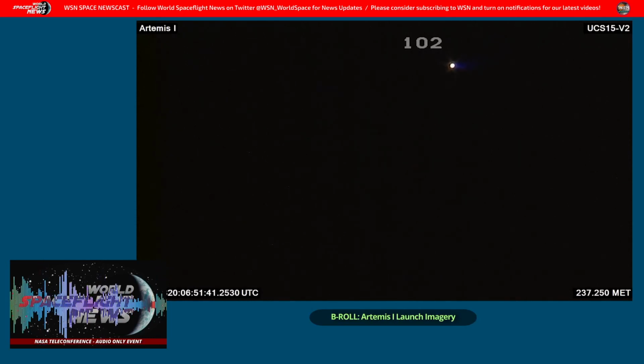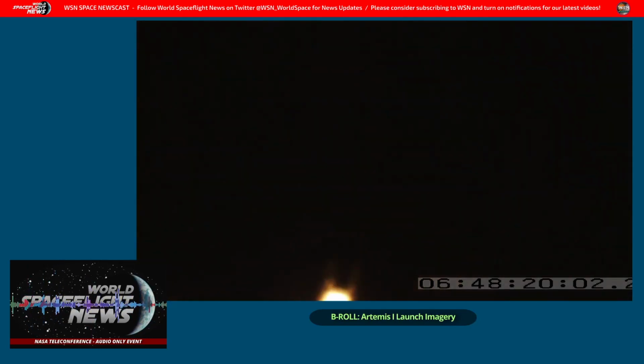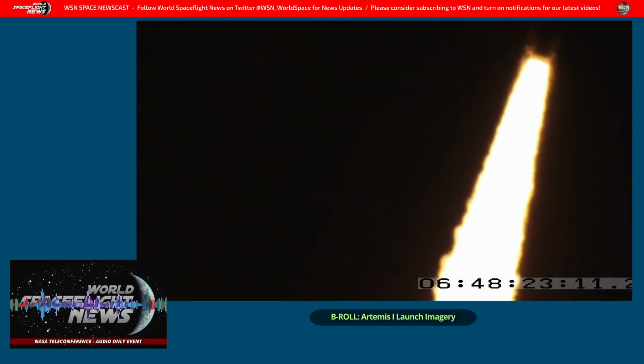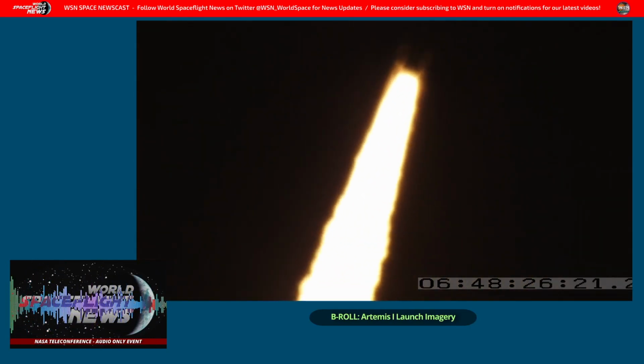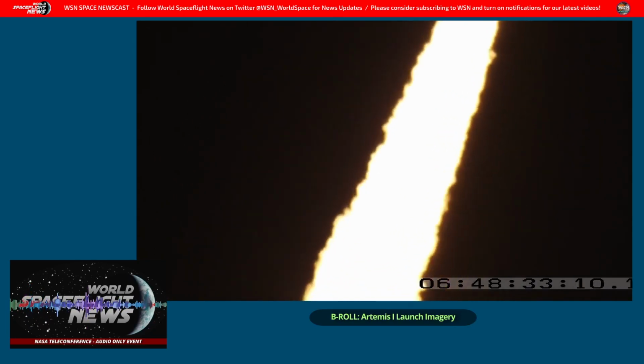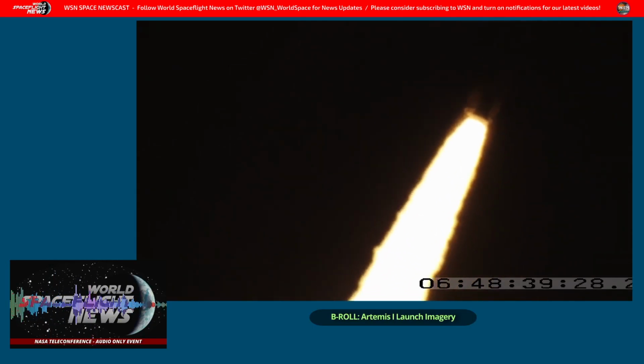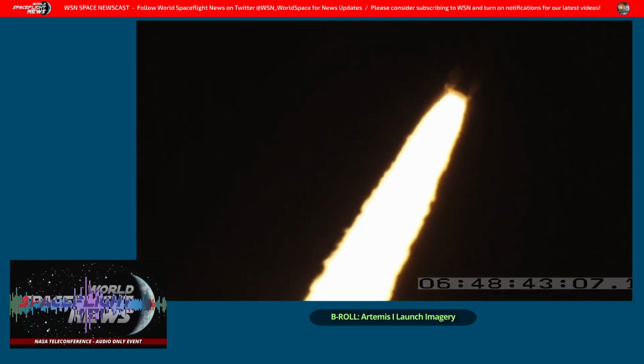Yeah, thanks, Eric. Absolutely watching the Starship launches. We need them to launch. We need them to buy down technical risk for us around cryogenic propellant transfer. They obviously need to launch a few missions to make that happen. That doesn't mean all progress has stopped for us. We continue to have contract milestones with them to buy down our risk and to show progress around a multitude of things, including tech development. So yeah, watching it, looking at the contract that we have with them, and frankly the technical risk they need to buy down before we're ready to launch crew. So absolutely watching it.